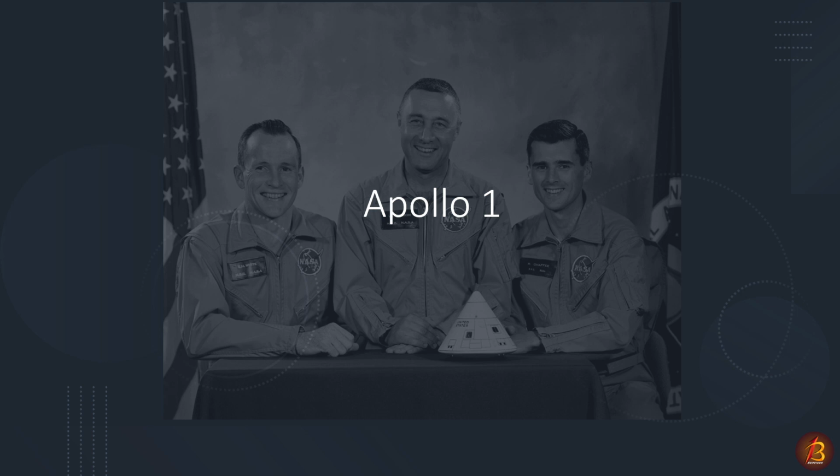And so it's really interesting that they say an awful lot of people have devoted more effort than I can describe to make Project Mercury and its successors as safe as humanly possible. But we also recognize that there remains a great deal of risk, especially in initial operations, regardless of planning. You just can't forecast all the things that could happen or when they could happen. And again, in part of risk management, this is why we have contingency and reserve analysis, right? There's a point to that, and that is because we can identify the known unknowns, but the unknown unknowns are unknown unknowns for a reason.